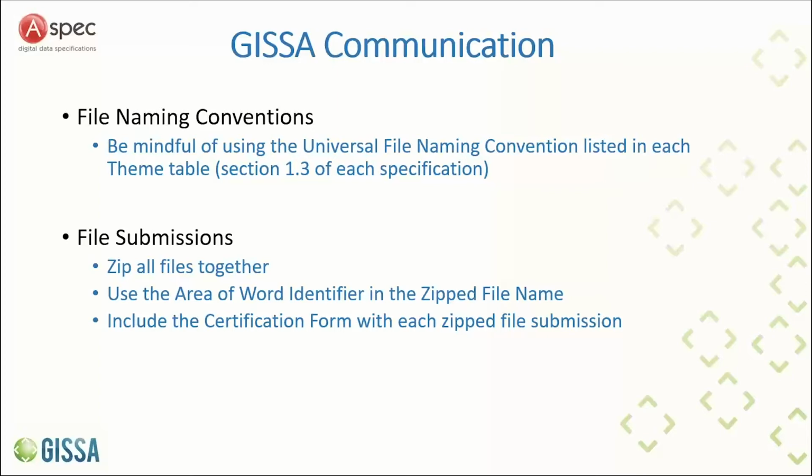What's the purpose of the certification form? The purpose is that you have recorded the information about that particular project as a summary. The certification form also confirms who has collated the information. It also provides you with the opportunity that if you were the company or individual collating this information and you also sourced some information from another consultant or a contractor, you can put that into the certification form. That all forms part of the governance process for the handover.